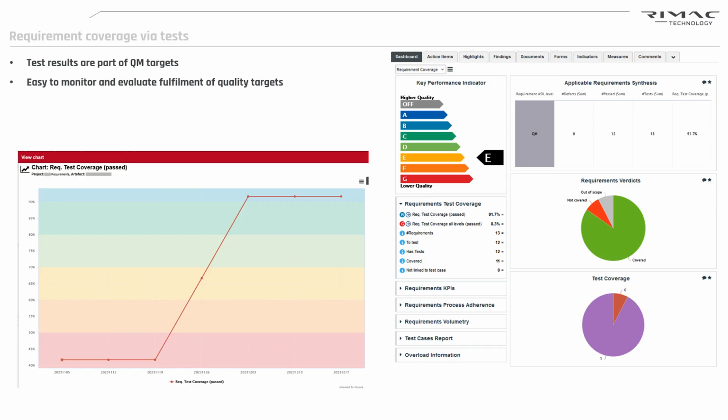And finally, the graph in the middle represents requirement test coverage over time. Initially, during the test specification period, no new test cases were executed. Then, during the test execution period, test cases were executed and logged, showing how requirement coverage increased over time between weekly baselines.